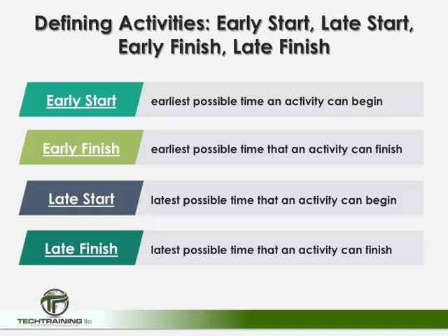Late start is the latest time that an activity can begin and still finish without impacting the overall project time. And lastly, late finish is the latest possible time that an activity can be completed without impacting the overall project duration time.